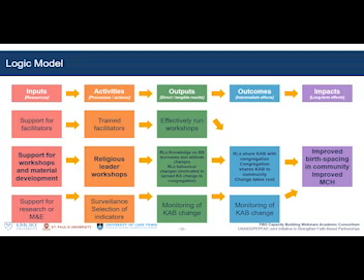In some of the work we did with stigma in local faith communities, we actually tried to implement a mini logic model inside one of the outcomes, so that the result of the training, I'm looking at the one that says share, be the congregation, and so on. That little box ended up being that each local congregation did its own little mini logic model. What activities they're going to do, what outputs, how are they going to measure? I can't say it was totally successful, but that was a place where we tried to apply the logic model.